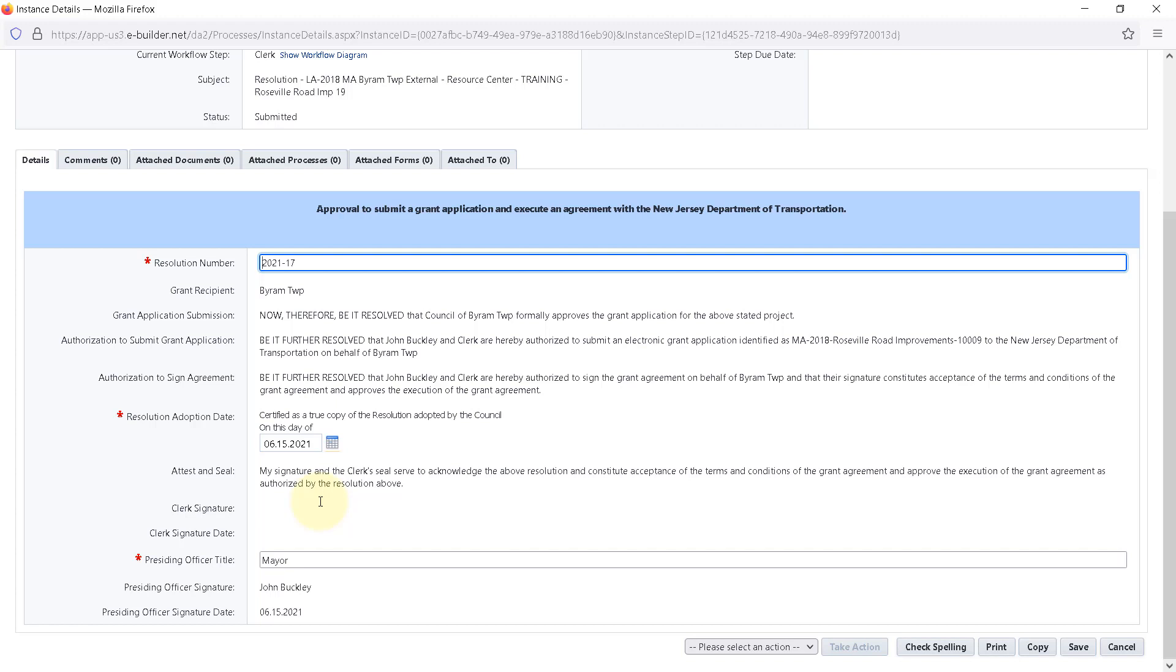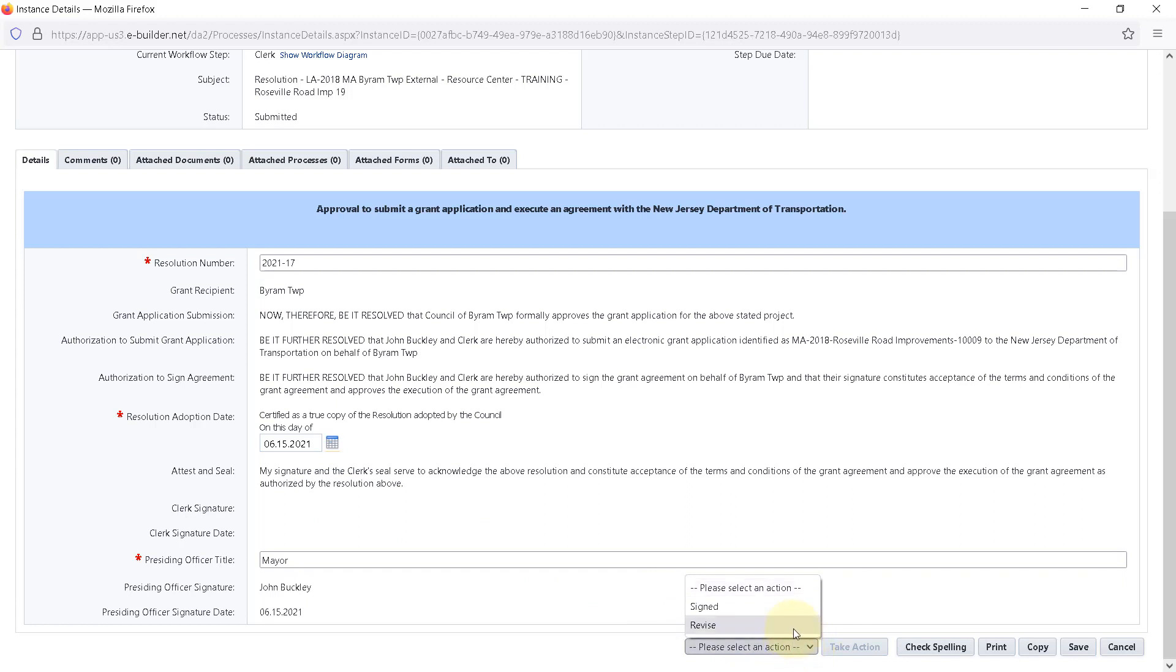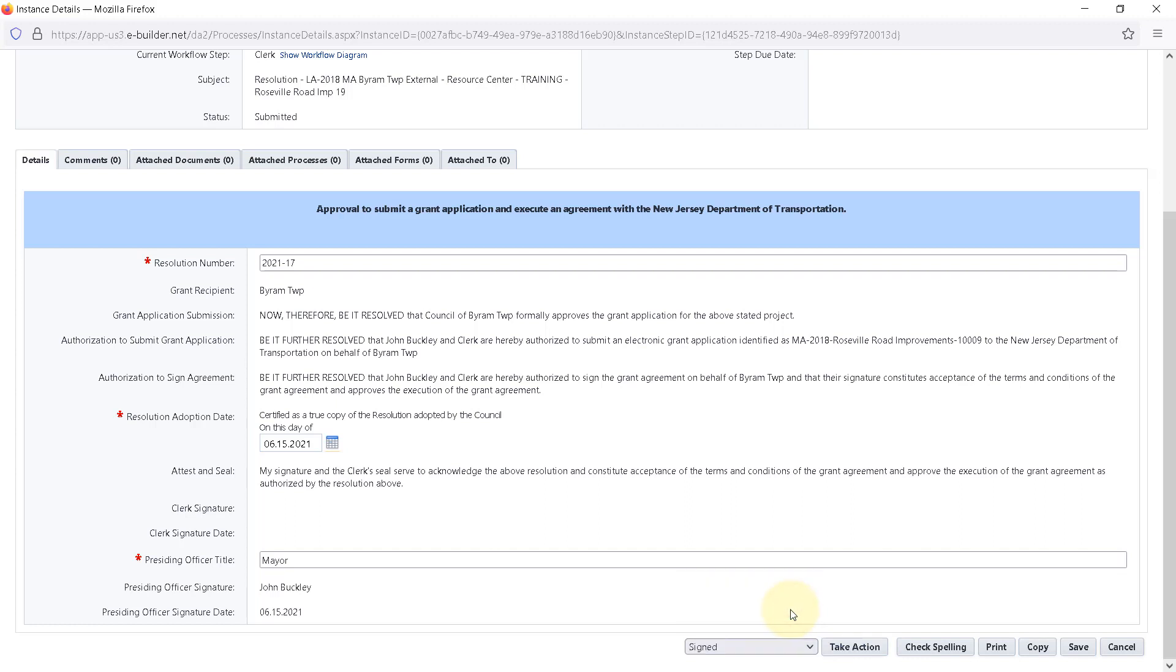Revise or Sign. If any of the information needs to be corrected, the clerk can select the action Revise, which will reroute the workflow back to the presiding officer for any necessary corrections. If everything looks good, the clerk can move the process forward by selecting Signed from the dropdown menu and then clicking Take Action.